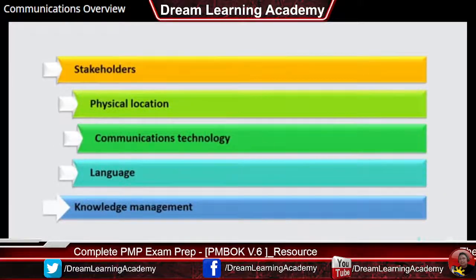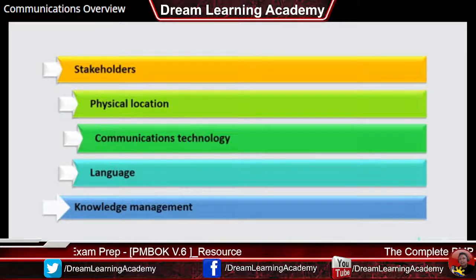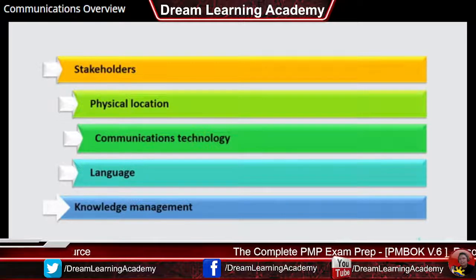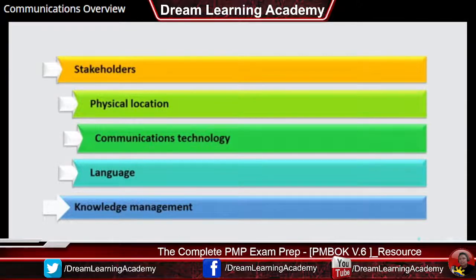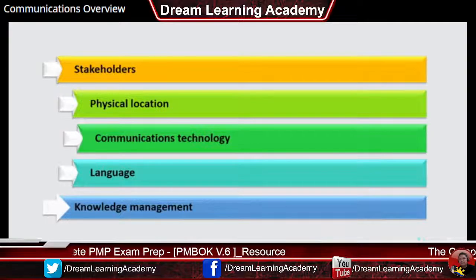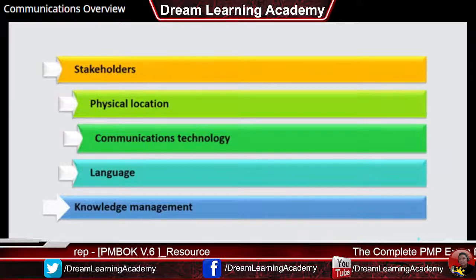Because each project is unique, the project team will need to tailor project communications management processes according to stakeholders — whether internal or external — physical location of team members, communications technology available to communicate effectively, whether one or many languages are used, and knowledge management within the organization.